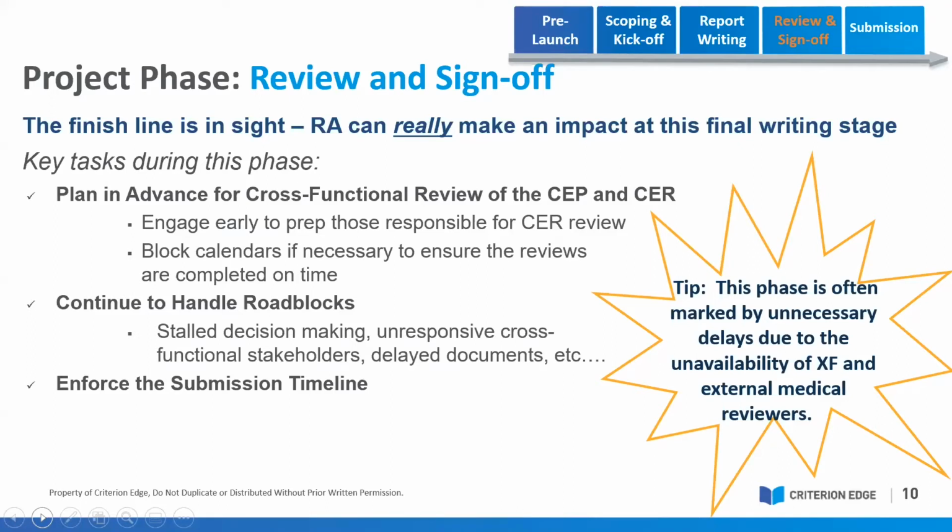And then it usually goes back for a second round, more review comments. A week goes by, especially when it's cross-functional, and then more updates by the writing team. That's 4 weeks, that's a month. So plan for a month.